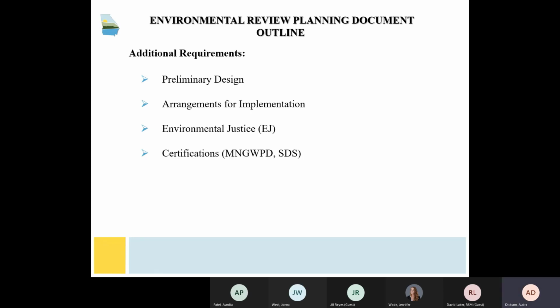A general description of the proposed treatment process or proposed sewer lines or pump station, including cost estimates based on a preliminary design, an outline or schedule of the project implementation, the final requirements of the project, funding sources, and if there is a financial impact to the applicant's customers, a user charge system.